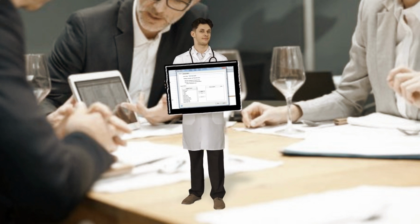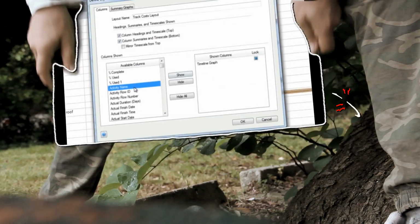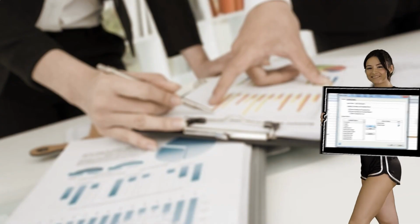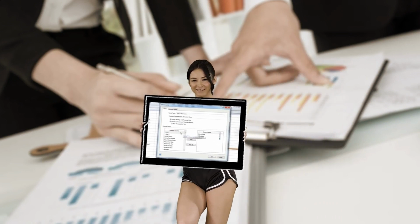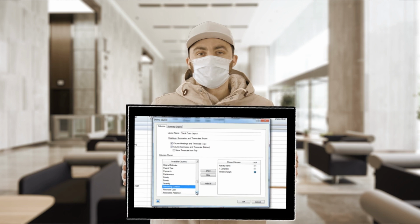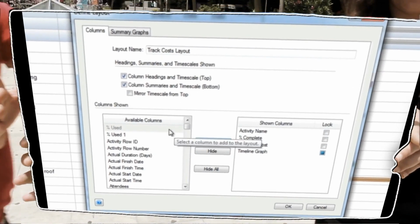Or use project management planning software to work it all out. Most software tools, whether they are standalone Gantt chart software or fully featured project tools with integrated timesheets, will have the option to create a resource report. The resource report will show the breakdown of which project team member is allocated to which task on which day.